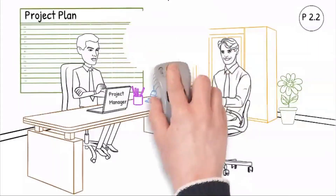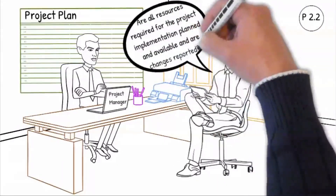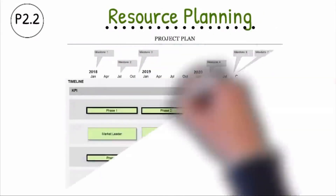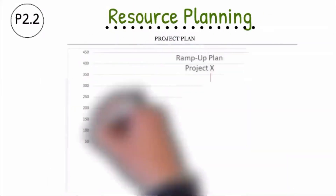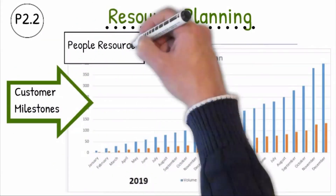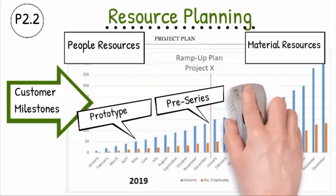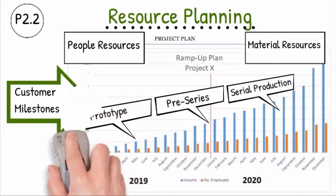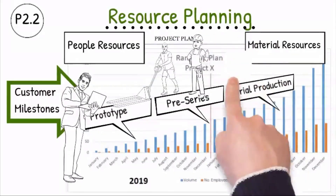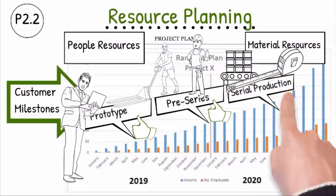Question P2.2: Are all resources required for the project implementation planned and available, and are changes reported? Resource planning takes the customer requirements into account and is based on the contract covering the project. The people and material resources will be made available according to the customer milestones as defined in their ramp-up planning for the different customer build phases, to ensure that all employees, production and test equipment will be available at the right time and capable to achieve the customer volumes. Review and adjustment of resource planning is carried out when changes occur, triggered by the customer as well as internal changes or supplier changes.